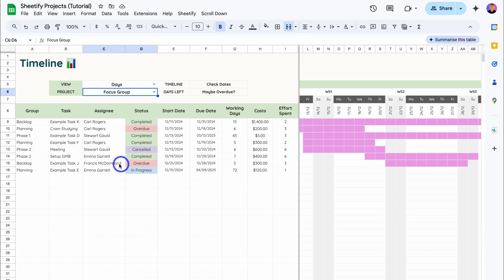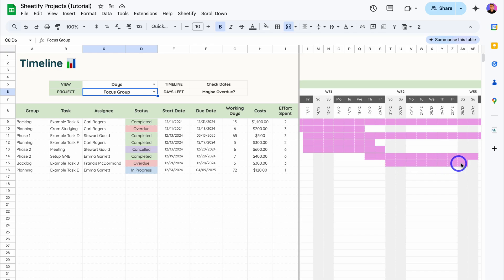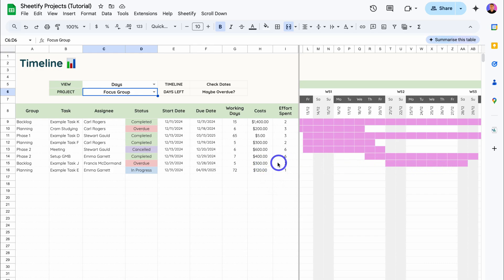Then the working days over here. For example, with this task over here which is overdue, the working days are five days. That's because this task starts on a Saturday and ends on a Saturday, meaning that there are only five working days. We can see the task cost as well as the effort spent on that task.